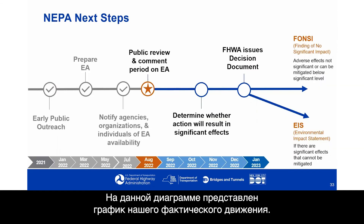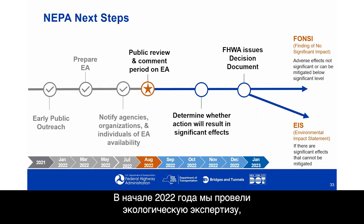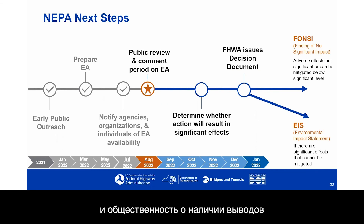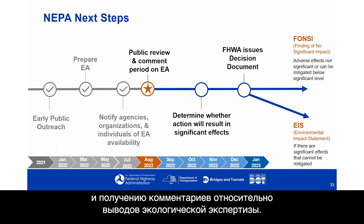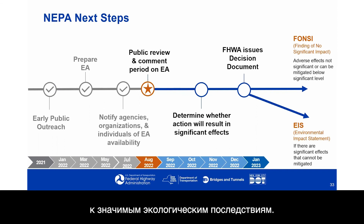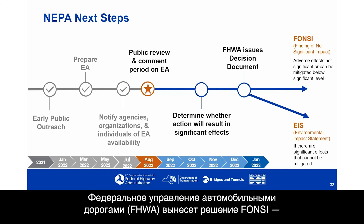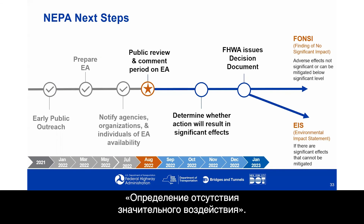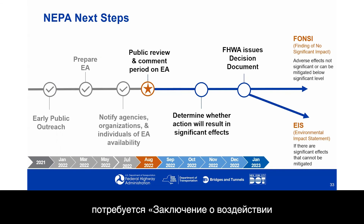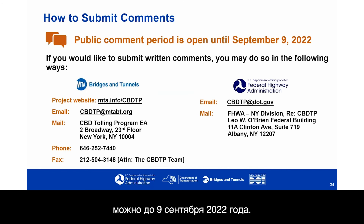With respect to schedule: early public outreach was conducted in 2021 and early 2022, the environmental assessment was prepared, agencies and organizations were notified of its availability, and we are now in the public review and comment period. After the formal comment period closes, there will be a determination whether the action will result in significant effects. In early 2023, Federal Highway Administration is expected to issue a decision document. If adverse effects are not significant or can be mitigated below significant levels, FHWA would issue a FONSI — a Finding of No Significant Impact. If there are significant effects that cannot be mitigated, an Environmental Impact Statement, or EIS, would be required. The public comment period is open until September 9th, 2022.